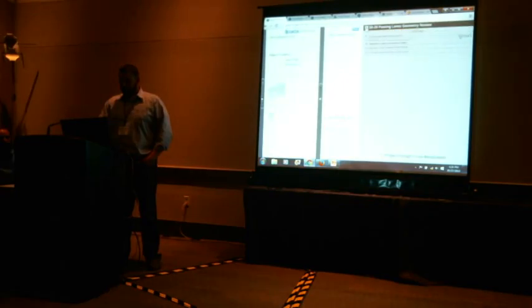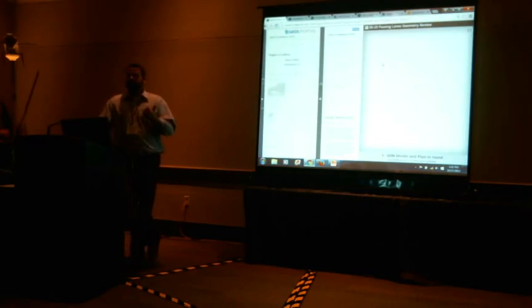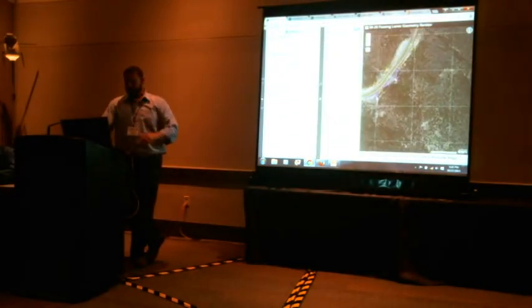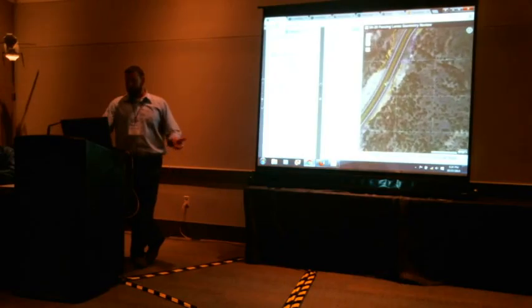We're also, the 60% plan in hand is completed. I've got it in my email right now to convert the data, and once that's converted, I'll let him know. He'll go in and plug it into this application. It'll be there, and in 2 weeks he'll have his milestone meeting, and all the partners, players of that project will come in, and they'll open this up and say, okay, where are we at? This allows them to go back and forth. Well, what did our 30% look like at milepost 11? Well, they can go in and look at it. They can look at the different cut and fills or whatever aspect changed about that project.